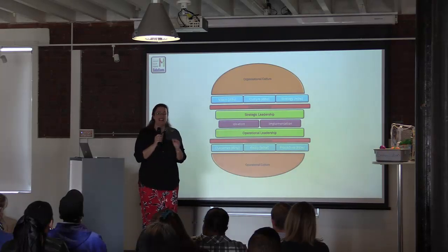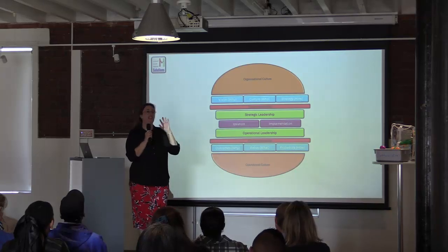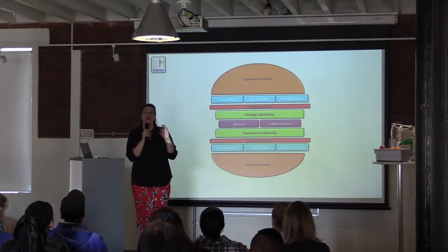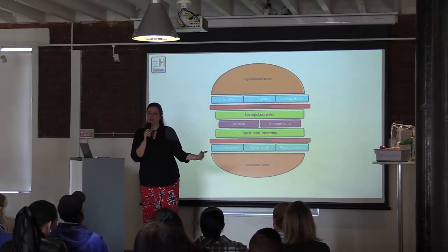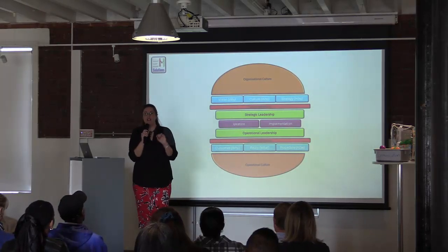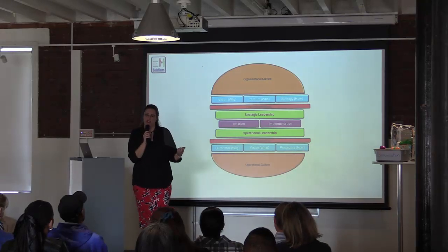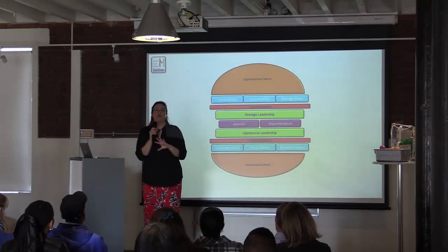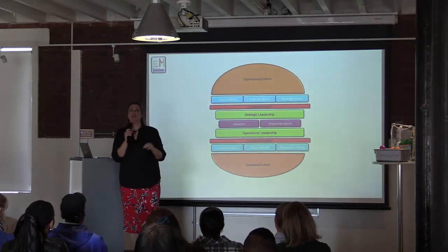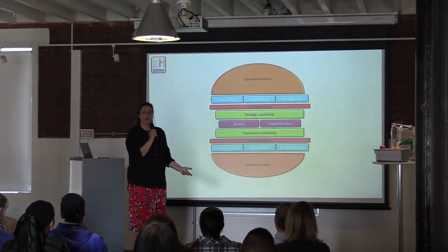Another example is a client who uses what they call the Gantt. Okay? Now, it's not actually a Gantt chart. It's really more a work plan. But it captures all of the activities that they have committed to their donors to do in the course of the year. That's normal programmatic planning. But what they've done is they've added the donor, they've added the budget line, and they've added the budget amount, so that they have all the information they need to communicate effectively with finance about where this expenditure is going, and finance have all the information to know what's happening.